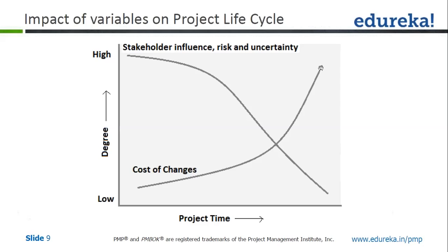That is the significance of why it is important that you consider all the stakeholders in the beginning. If you find, for example, that legal requirements for the project were not taken into consideration, it may have a significant impact on your project, as a result of which your schedule will go for toss, your cost will go for toss. Hence it is imperative that you identify all the stakeholders at the beginning of the project.